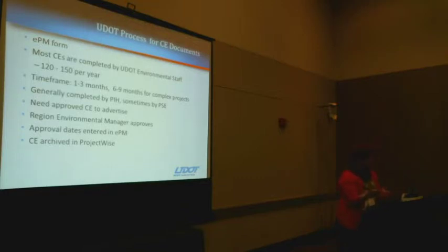Sometimes they don't get approved until PS&E, which is fine as well. NEPA has a stipulation that you can't go beyond 30% design in your NEPA process, but 30% design is a little bit flexible as to how you interpret that. A lot of people interpret it different ways, but we generally shoot for plan in hand, sometimes PS&E, but you can't advertise until you have a signed document.